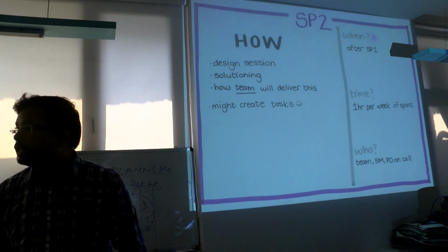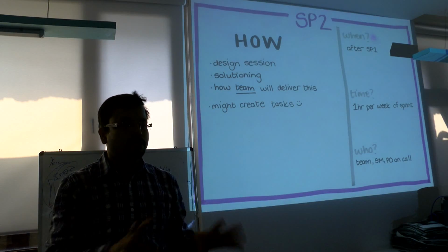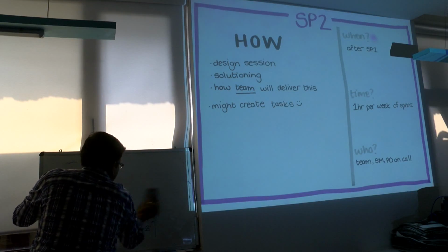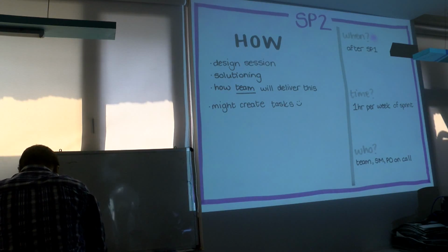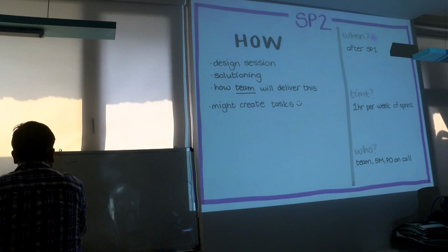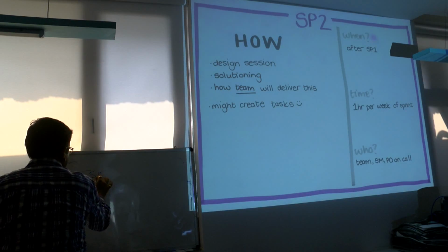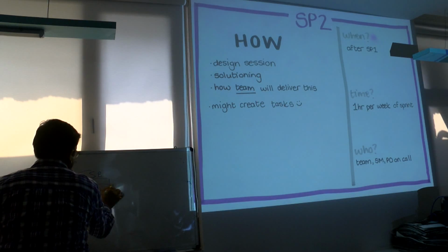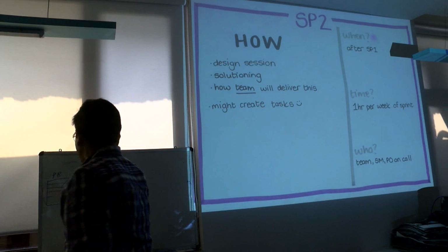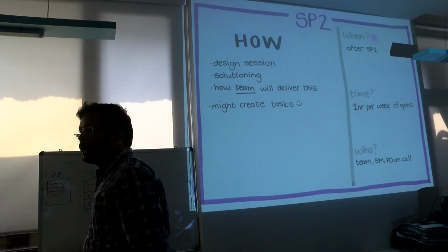After just finishing sprint planning 1, the product owner will give you the tasks. This is 4 tasks. Now what happens? PB means product backlog. The 4 items will move to the SB, the sprint backlog: 1, 2, 3, 4. Now these 4 items are removed from the product backlog and come directly to the sprint backlog.